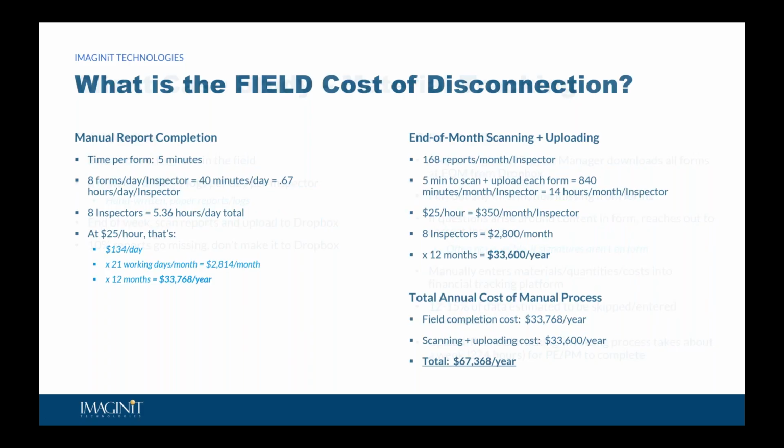Okay, so let's attach some numbers to this, right? Again, this was a specific customer or client, but in terms of how much I'm expensing for field inspectors and PMs, I'm just using national averages. Let's put some numbers behind this challenge. In the field, each inspector spends about 5 minutes per form. If they have 8 forms a day, that's 40 minutes per inspector per day. Multiply that across the 8 field inspectors I mentioned for this organization, and now we're talking about more than 5 hours every single day just to fill out material delivery logs.